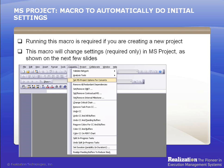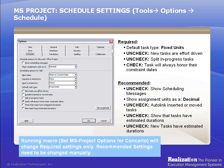Before you create a new plan or open a non-Concerto project network, you need to set the MS Project options so that the project network conforms to the Concerto software. To do this, on the Microsoft Project menu, under Concerto, click on Set MS Project Options for Concerto. This is a macro that will change the required settings to those shown on the next few slides. Note, not all settings require changes. You can also change these settings manually using Microsoft Project Tools and Options.